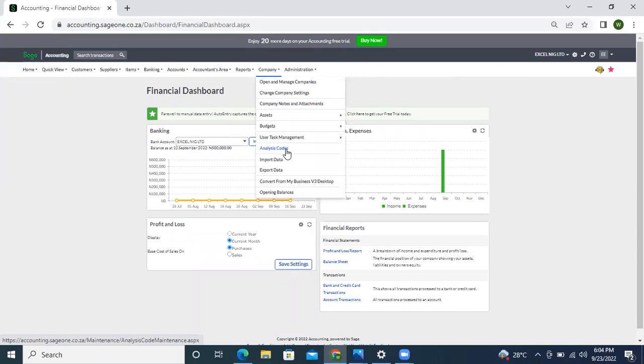And tracking costs by project with Sage, another advantage it gives you is that you can also maintain statistics on various projects, okay? Including the starting date, the completion date, the progress of each job, and you can follow them up and also look at the reporting aspect, which is key for you, which provides the capability to generate reports to display this information, showing you if a job is over or under budget for any task that is involved. And this can help you control your cost by adjusting one task prior to the project completion.